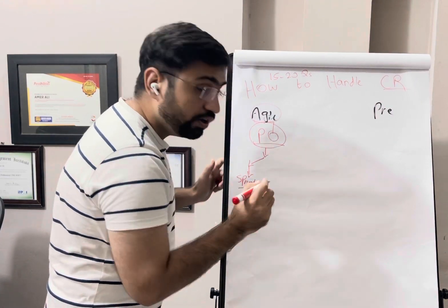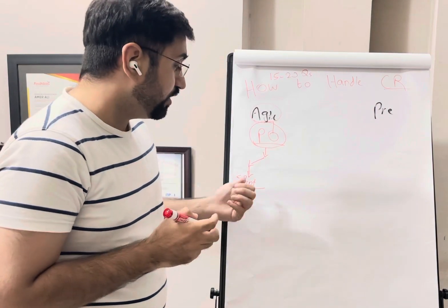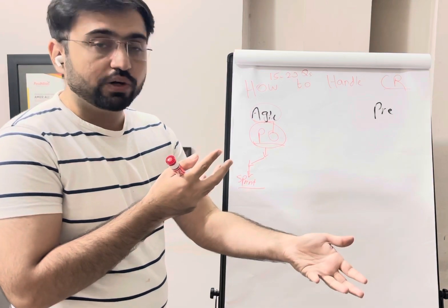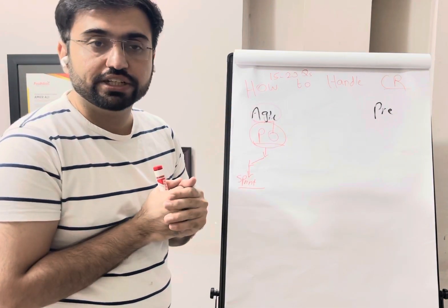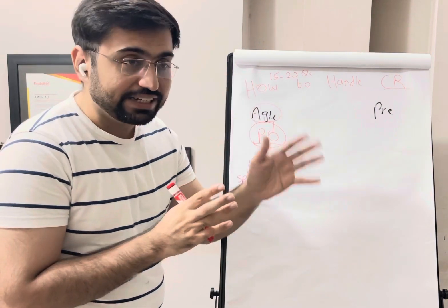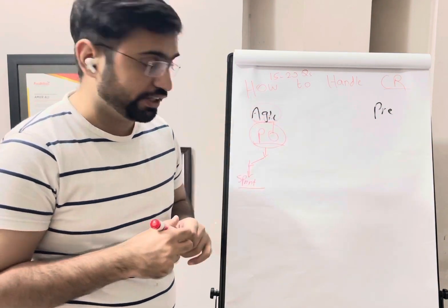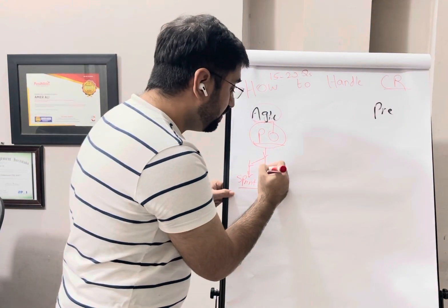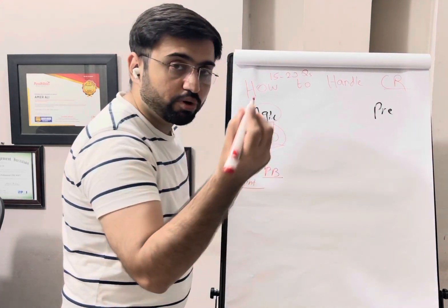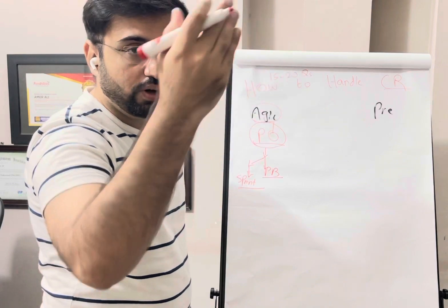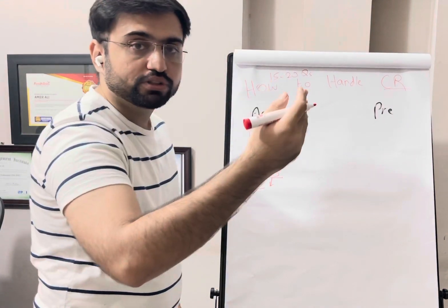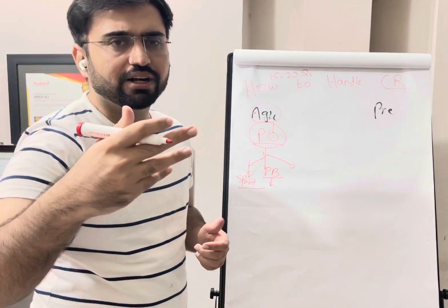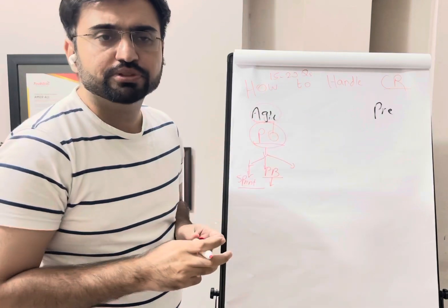Only the product owner can add anything into the current sprint. He will have a discussion and trade-off with the team, like taking out some user stories to maintain velocity, but he can put something into the current sprint backlog with team discussion. If the change can wait until after the sprint, the product owner will add it to the product backlog, refined as high priority, high value, high risk, making it the most important item. If it's low priority, it goes into the product backlog for subsequent sprints.